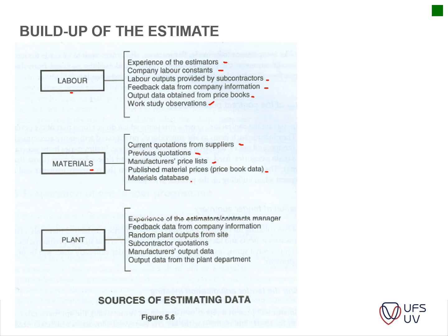And then you start building up a material database. That's very handy whenever you do tenders, because it just makes the estimation process quicker whenever you have a nice database set up. Then you look at your plant. The experience of the estimator is very important with your plant because it's all about operation time and cost whenever you are calculating your plant.